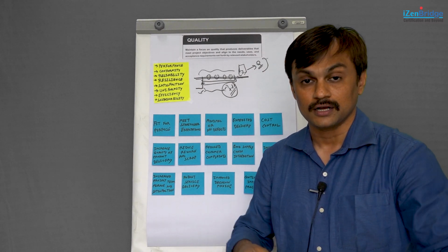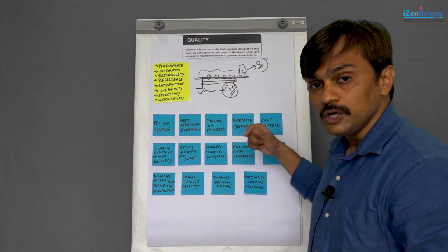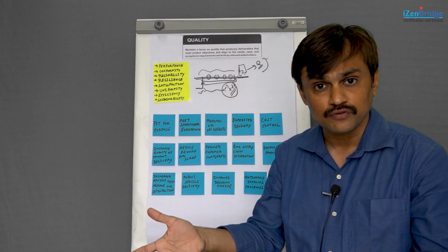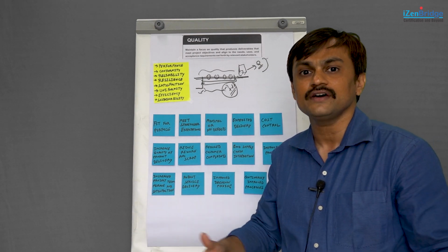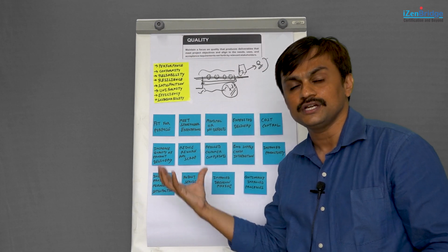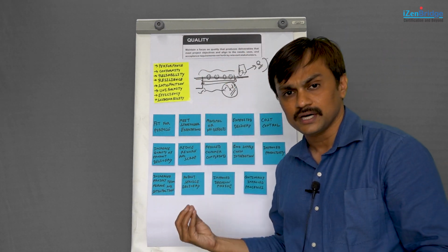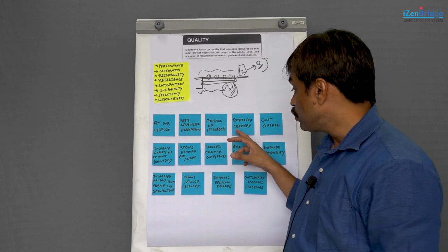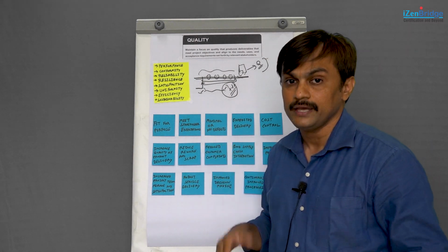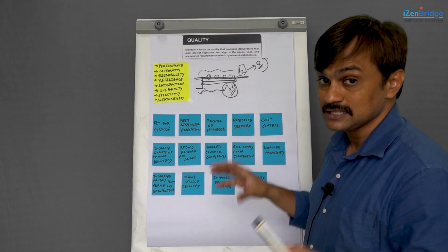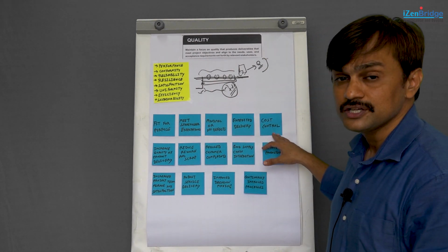They delay my work. No, because if you do the work one time, and the one time you deliver it, it is getting used well, then it is perfect. You do not have rework happening. When you do something, the customer complains about it, you take it back, you spend one more month and then deliver again, that creates bigger unpredictable delays. So if we do things in the right way, it is expected to expedite our delivery, and that is the objective of our quality. It helps us in reducing cost.